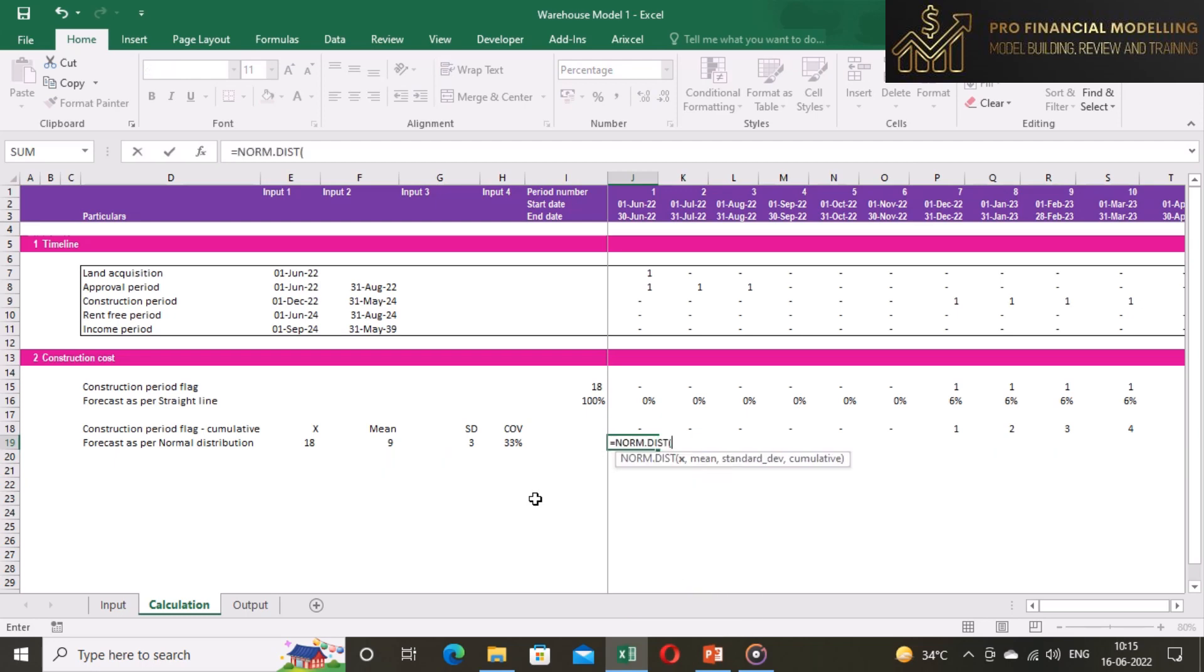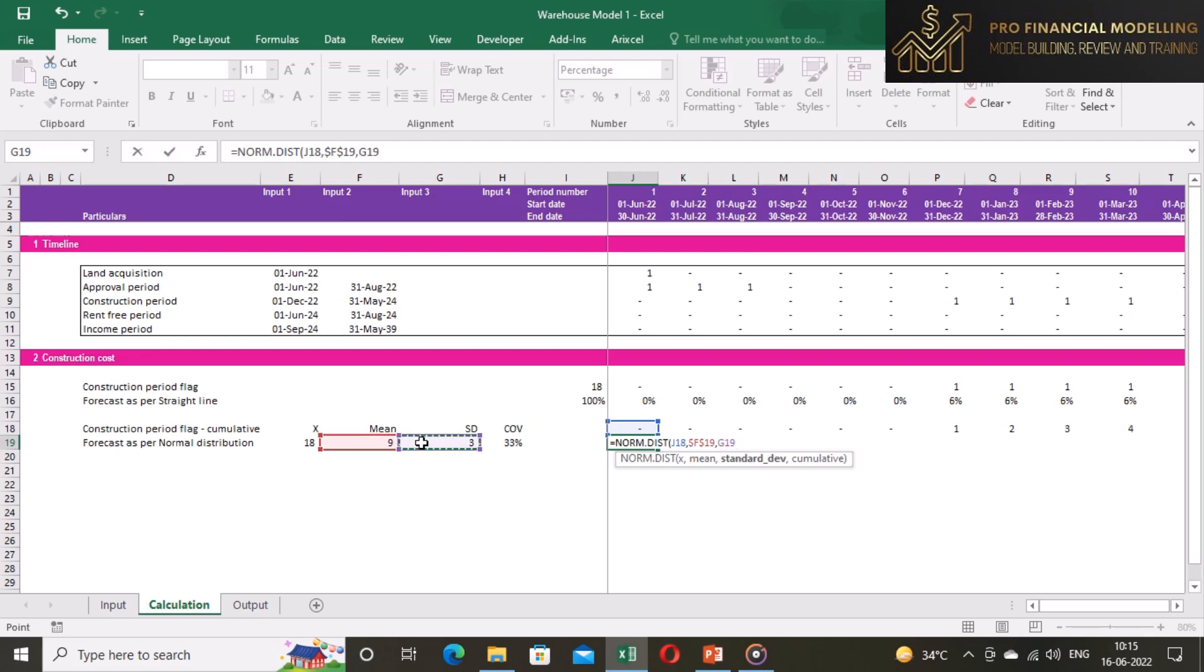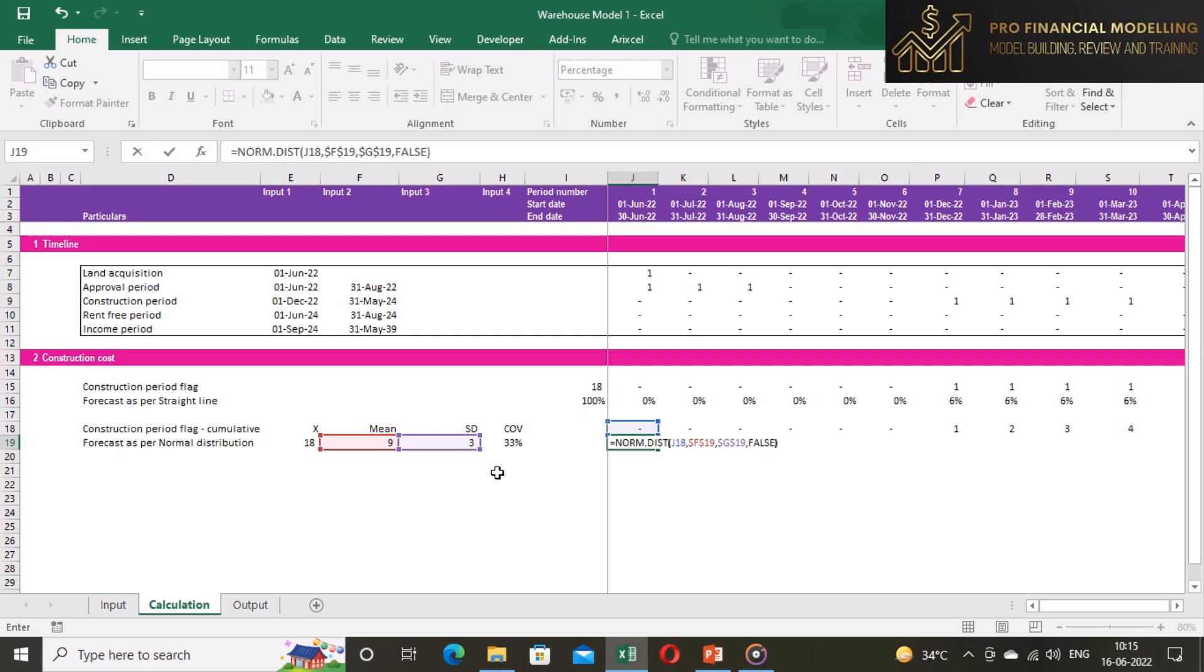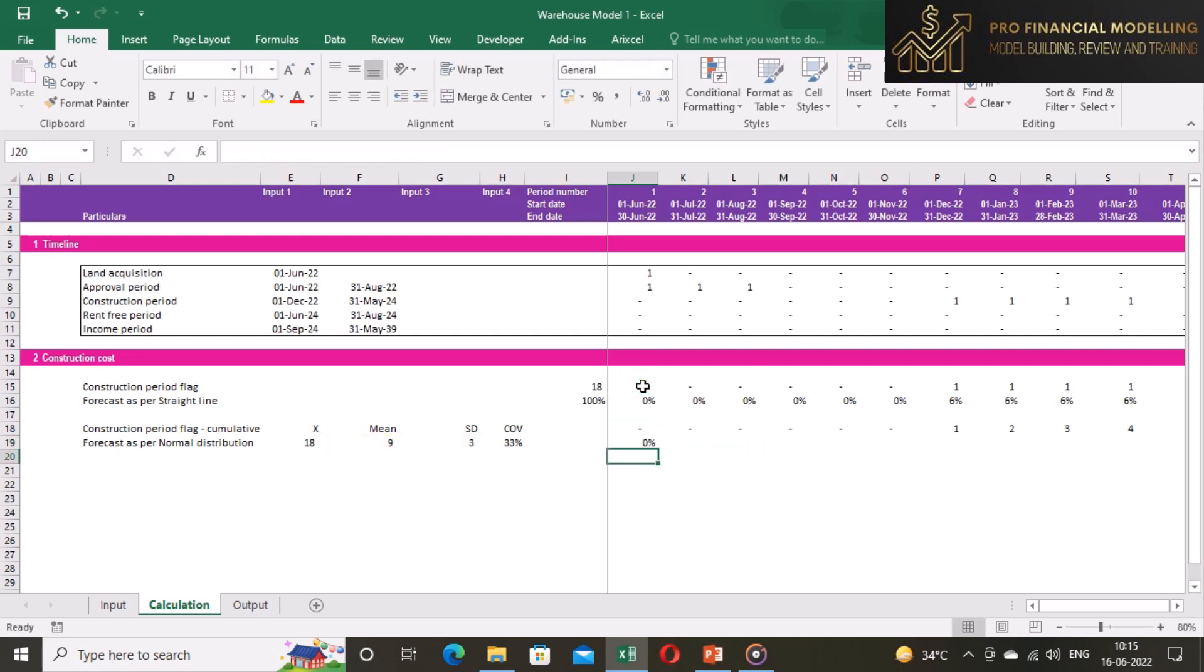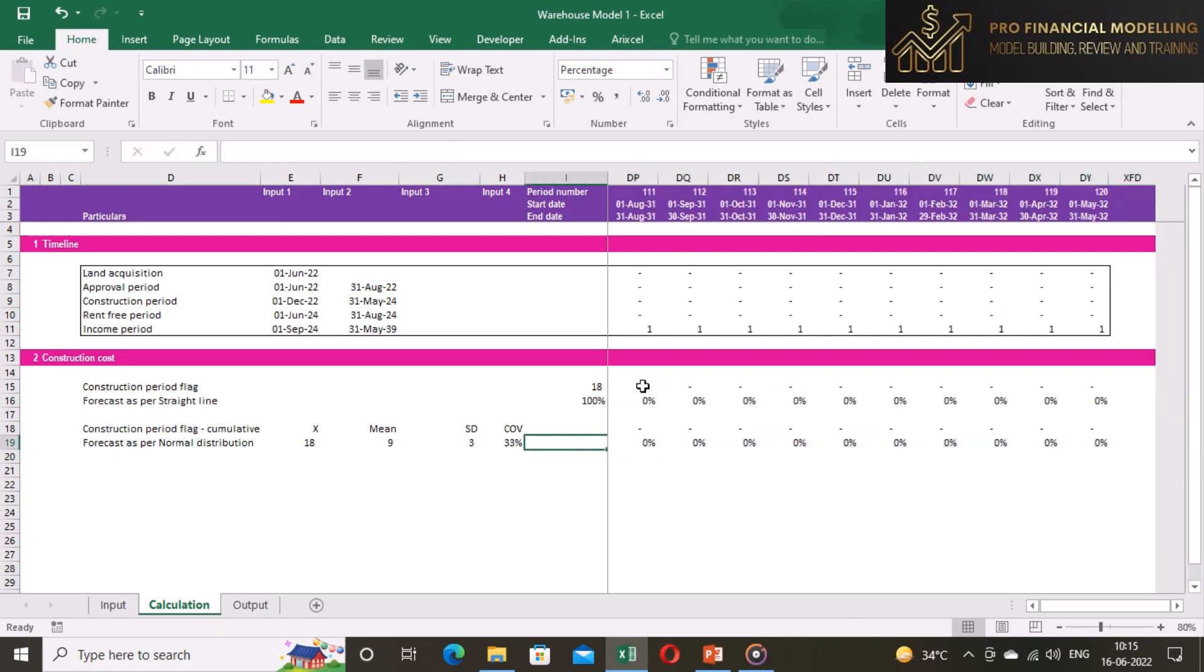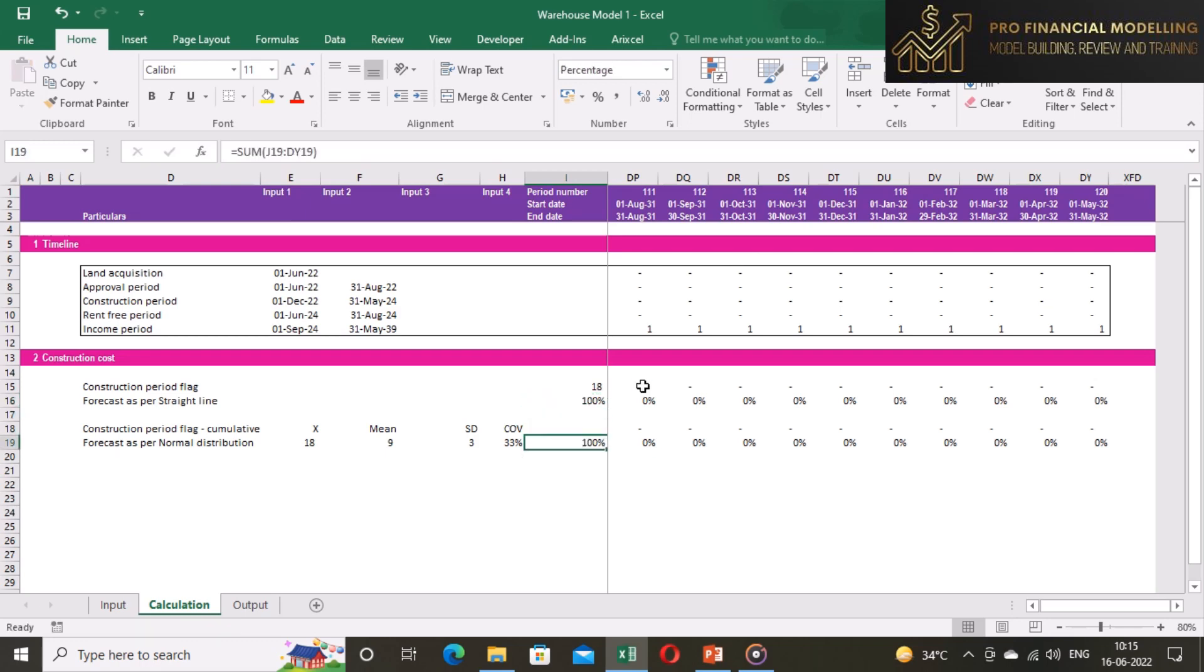Now we will insert the formula for normal distribution which is norm dist. Then, x will be cumulative construction period from one row above. Mean and standard deviation will be from input. Multiply this formula with construction period flag to avoid value in period other than construction period. Now we need to freeze these inputs and we can copy this formula across the row.